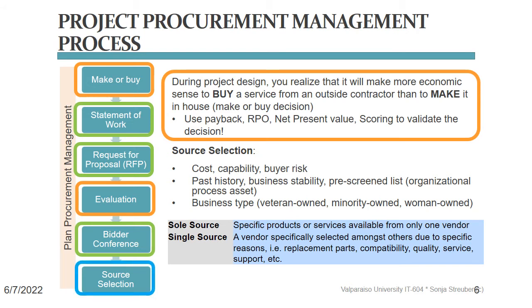To select the best subcontractor for your advertised scope of work, you will want to look at not just the cost of their proposal, but you will want to understand how good their work is, and it never hurts to call their references. And you will want to look at the health of their company itself to decide if there's any risk in hiring them.